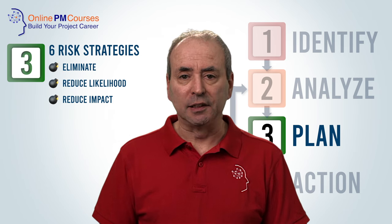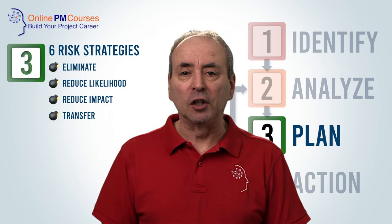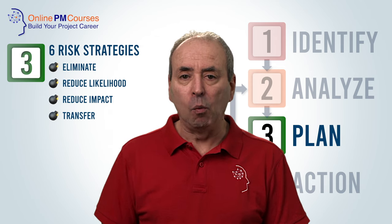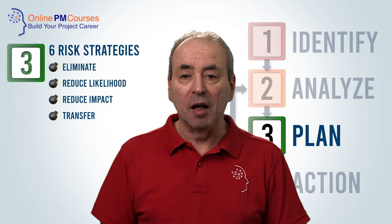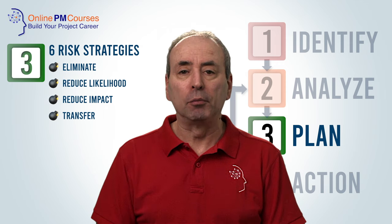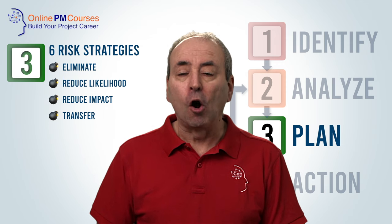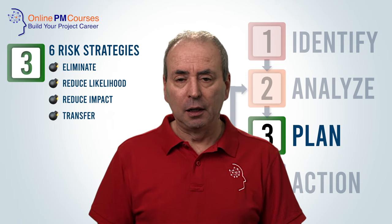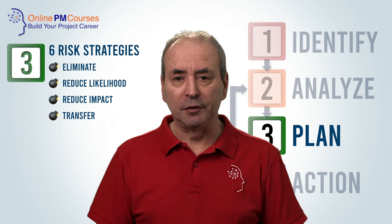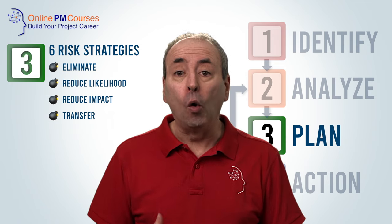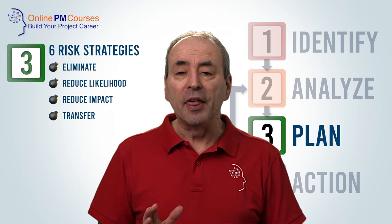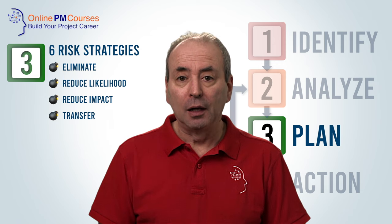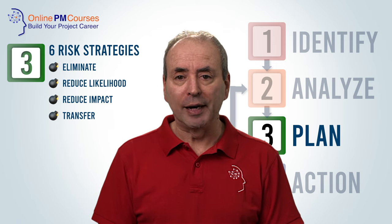The next strategy is to try to transfer some or all of the risk so that the impact affects someone or something else rather than your project. The commonest examples of this are insurance products, which transfer the financial element of a risk, or contracts, where the contractor takes on the risk as part of the contractual arrangement.